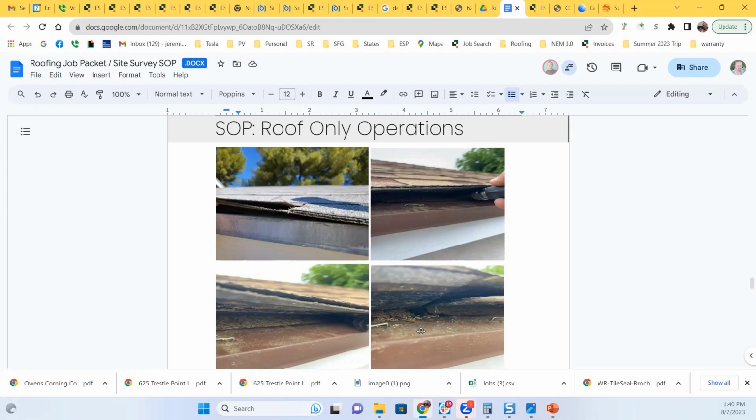And if you can, I would lift that up when you can and keep going until you see wood. And if you can't, I would take something like a screwdriver or something and try to peel back some of that second layer that's underneath the first shingle. So you lift that first shingle, scrape back whatever's underneath until you get down to wood, so you know how many layers are under there.